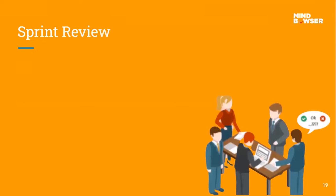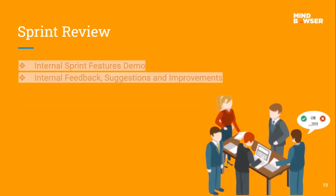After the sprint is done, we go to the sprint review section. We do an internal sprint feature demo whenever the team feels the sprint is complete. Then we do an internal demo and discuss, collecting all the feedback from team members — what suggestions they have, what improvements they think of. We note it down and put it in the backlog.